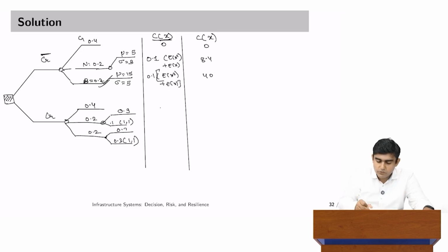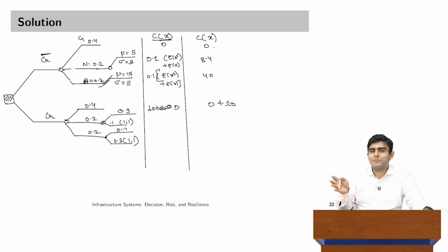Similarly, when we go below, when 40% times there are absolutely no delays possible, so the cost involved is 0 when weather is good, that happening is 40%. Now given that weather is normal, then some delays are going to happen. However, this particular cost would be jacked up by 10, because if you have launched a crash program and weather remains to be good, you have already paid for resource mobilization.